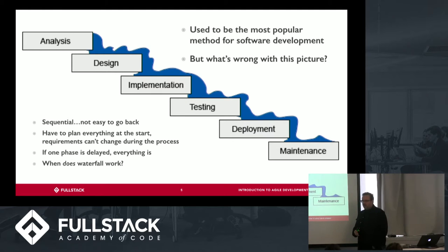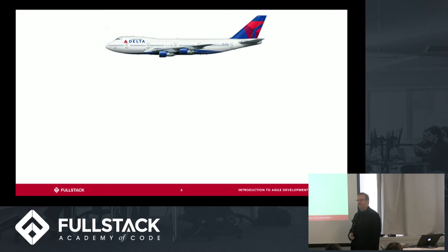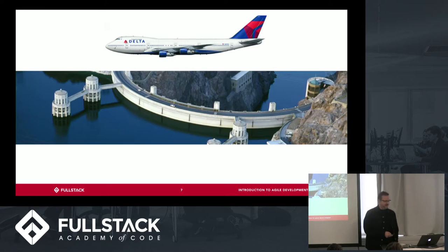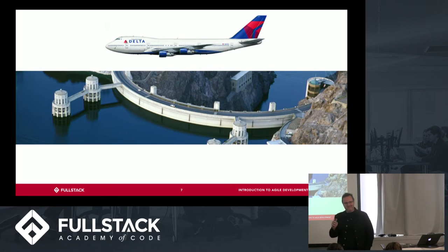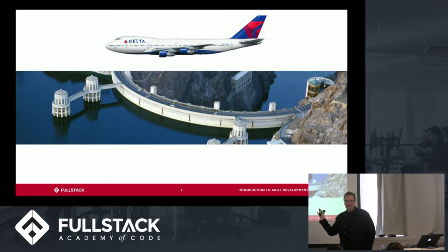So there are actually some situations where waterfall works. For example, if you happen to find yourself building a 747, it'll work for you. If you find yourself building a giant dam, it'll work for you. The reason is these types of projects are huge engineering projects, and they're really based on physics, right? They're not going to change all that much from when you begin the project. You're not really dealing with human users, in other words.